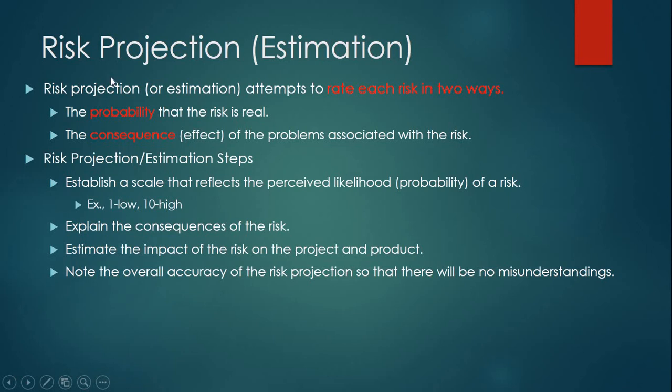Next is risk projection. Risk projection attempts to rate each risk in two ways. First, the probability that the risk is real. Second, the consequences of the problems associated with the risk.